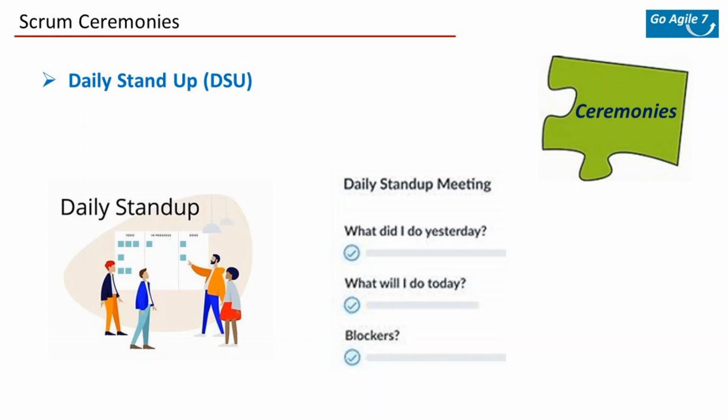Simple, right? I see in many places, they run these meetings for 30, 40 minutes and sometimes even an hour. But that's not an effective or efficient way. Once you run these for a month and get used to the Scrum ways, you should not need more than 15 minutes. And if there are some pointed discussions about an impediment or something else, they should have an offline meeting after the daily stand-up. But invariably, they engage all members for that 40 minutes or so, which you should avoid.